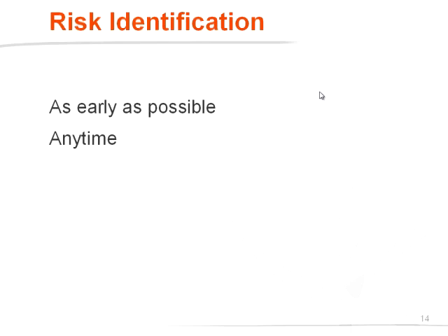And of course, you have to identify risks anytime. I think it's a good practice, and I do it all the time. If I have a project team meeting, after the official agenda, I ask all the participants, what new risks do you see? Have risks changed, or is anything else coming up? Do we have opportunities which we should use? And if you make it a habit to ask this question every time, it's a good starting point for risk management.